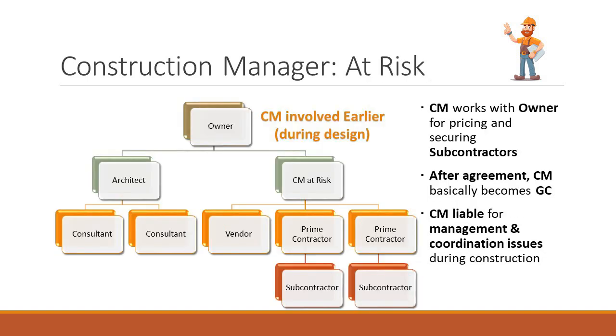The other is construction manager at risk. Now, as you look at this, this may be and does look a lot like the traditional triangle. Only what we have here is, instead of the word contractor on the right-hand side of the triangle, it's construction manager at risk. And what happens here is the construction manager at risk, if we went back to that fast track model, they get involved early before the drawings are complete.